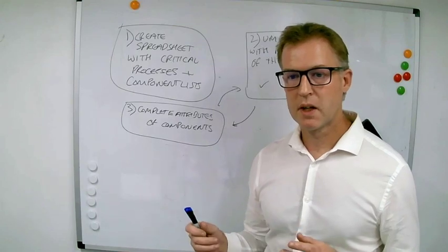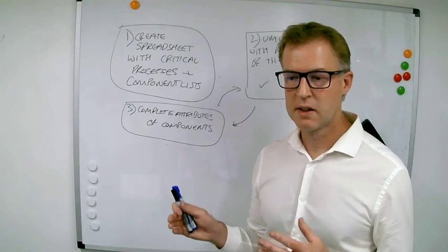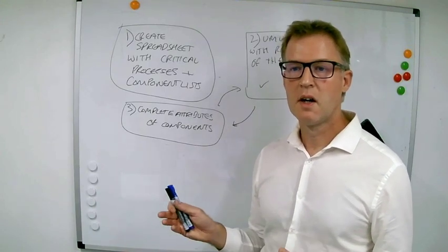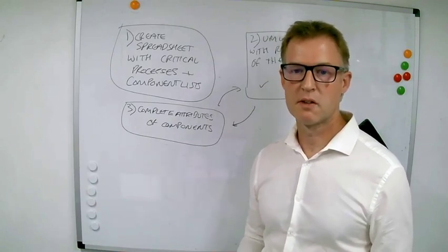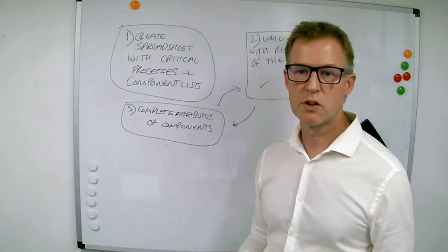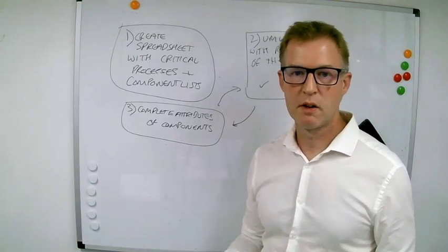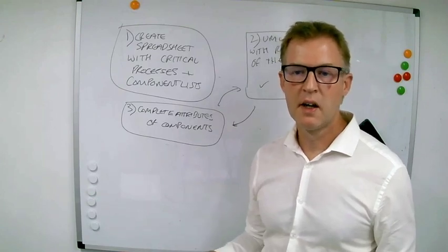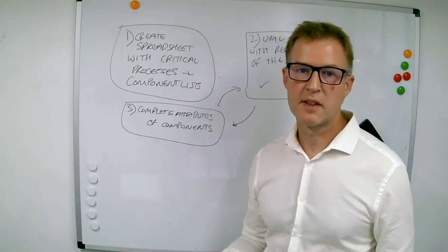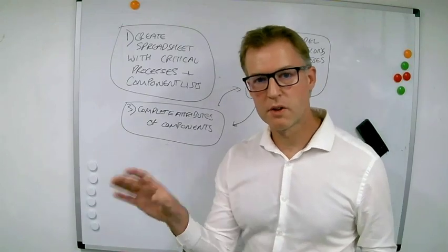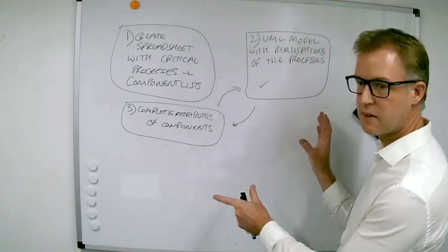But if you think about this as the end result, you want to be able to say, these are all the critical processes. We have analysed and documented all of these things. We know exactly what all the attributes are, and we have tested them to make sure that what we've documented is correct. And the reality is you'll probably find problems. But then you'll be able to say, we identified problems with resiliency, we've now rectified them, and we've tested and they've passed. So that's really what you want to get to. So that's the end of the analysis piece.